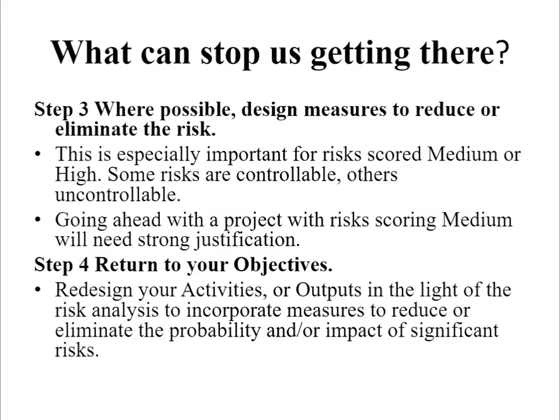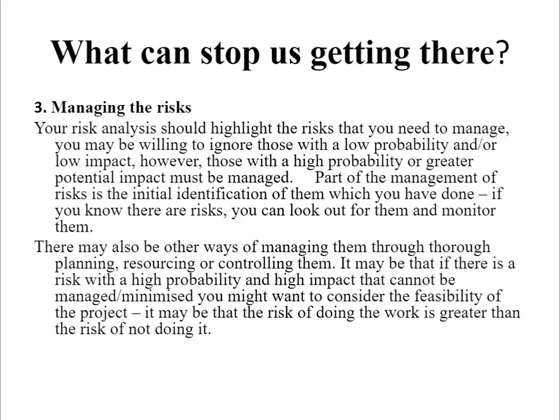In step number 4, you need to return to your objectives. Here, you need to redesign your activities or outputs in the light of the risk analysis to incorporate measures to reduce or eliminate the probability or impact of significant risks.